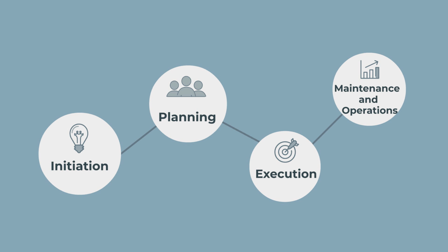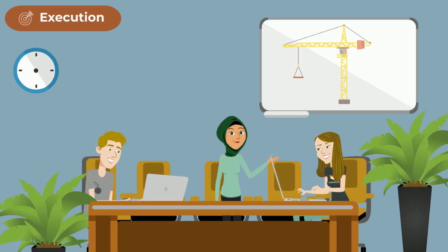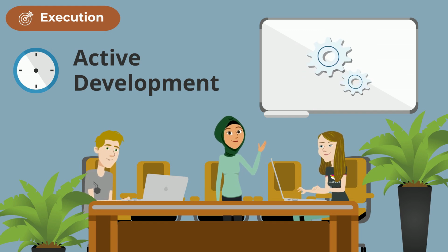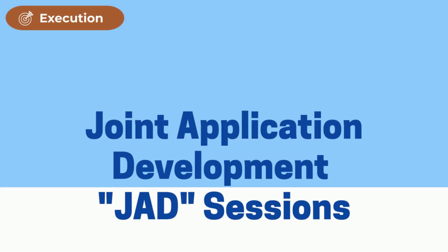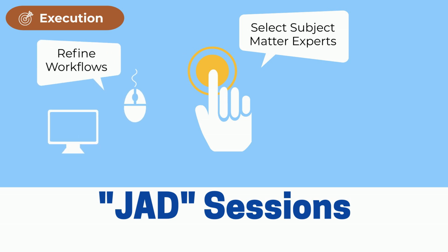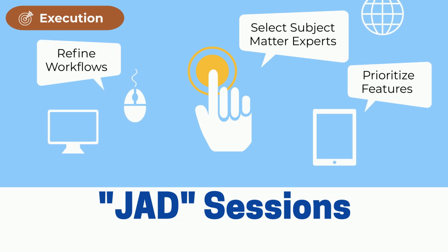Now that the vendor is onboarded, we enter the execution phase. Here we move from planning into active development, testing, and refinement. Joint application development, also called JAD sessions, happen with selected subject matter experts to refine workflows and prioritize features, guiding backlog refinement and future work cycles.